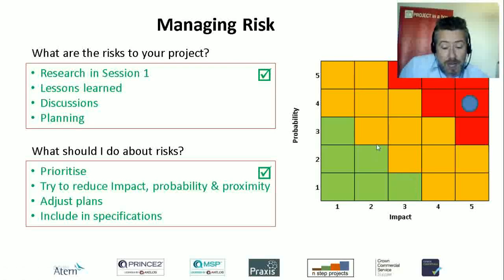And so this is a really good way of understanding these things. We'll have risks at what we call an inherent identification. When we identify the risk, how do we score it? Well, at that point it was a 20. And now, after we've put some actions in place and done some things to address it, it's now going to be a 3. We've made a significant change in the rating of that risk.